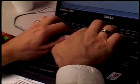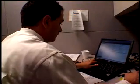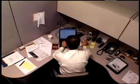I kind of liken mail migration to changing the engine on a 747 while it's in flight. There's very little tolerance for disruptions, and it can be extremely difficult if you don't have the right experience and the right tools. The Notes administrator has to shoulder the whole responsibility of managing the process. They have to keep a previous environment up and running. They need to deploy a new environment, do all the testing and everything else, do the necessary skills transfer so they can run that new environment. And then they have to keep the users happy and their managers happy with reporting and everything else. So the administrator has a lot of responsibility, and in some of today's environments with the smaller staff, it can be really hard to do.